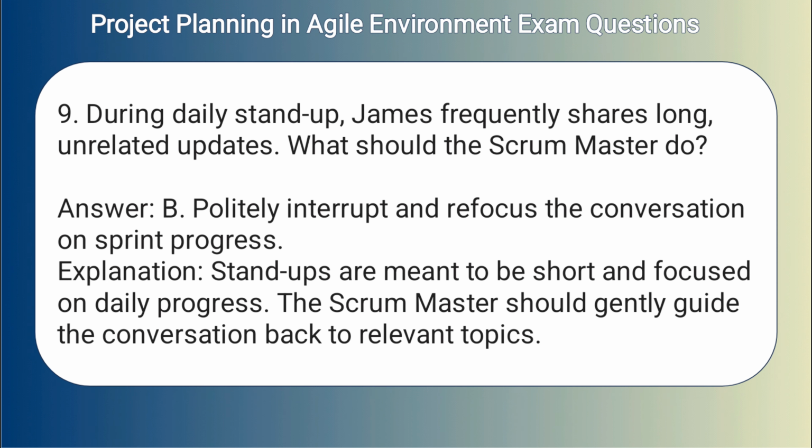Answer: B. Politely interrupt and refocus the conversation on sprint progress. Explanation: Stand-ups are meant to be short and focused on daily progress. The Scrum Master should gently guide the conversation back to relevant topics.